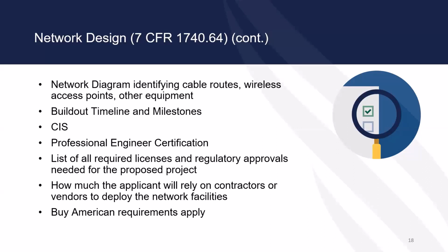And another thing that's key here, how much of the operation of the existing or proposed network, not really the construction, that's a different situation, relies on contractors or other vendors. And another key thing to remember here is Buy American requirements apply throughout the project. For every item, Buy American applies.